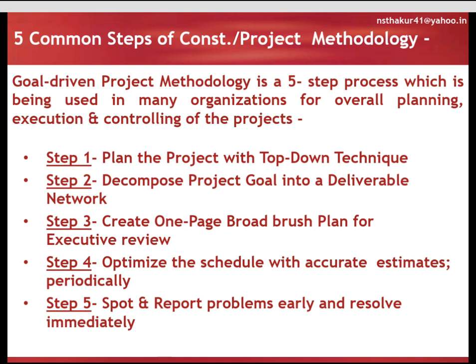Step 3. Create a one-page broad brush plan for executive review. The broad brush project plan is usually less than 2 pages. It contains the deliverable network as developed above, cost, estimated duration, resource requirement and defines the performance and success of the project. Step 4. Optimize the schedule with accurate estimates periodically.